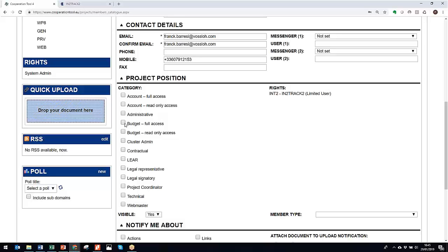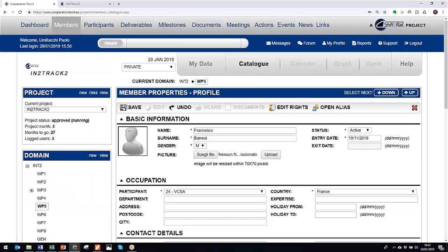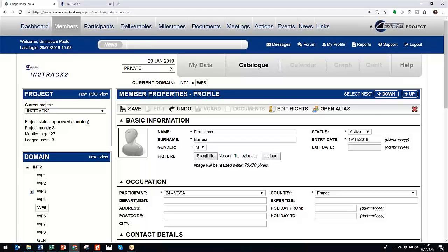It is only a matter of inputting it once, unless there will be a contract amendment. If there will be a contract amendment, it will be necessary to make changes. Otherwise, the budget will no more change during the project life. The account, on the contrary, will need frequent inputs at each period.